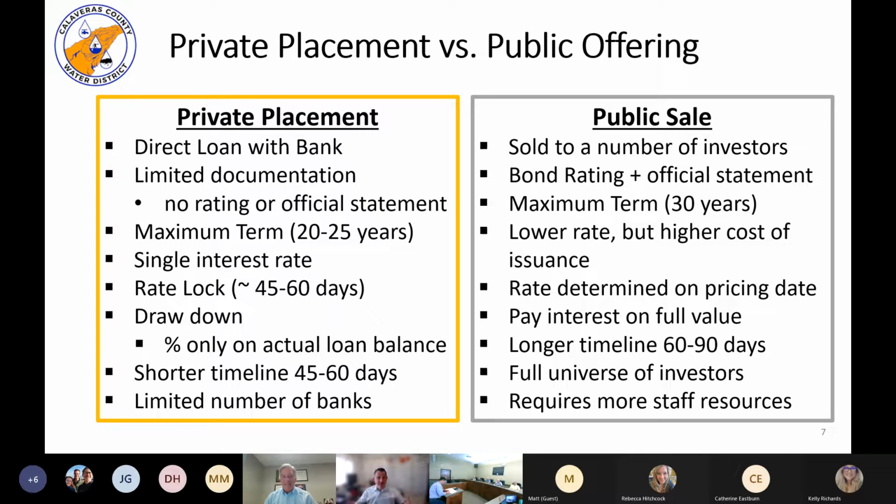I think we've gone through a number ourselves. I'll step back and say when we started, the project list was 115 million. I asked staff several months ago to try to prioritize due to the risk of failure. This is on that sausage making page, right? The risk of failure, reliability, negative impacts on public health and safety, regulatory liability or legal liability, anticipated growth in customer base. They looked at all those factors, and remember, there's still another 30 million. And I know one of the board members is looking at how you find that funding shortfall.